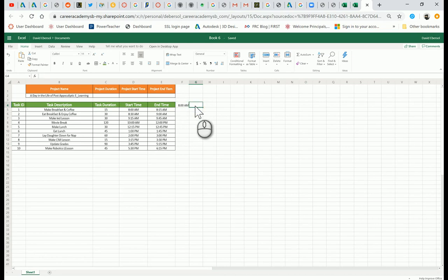Now, the next time has to be the next duration of time. So I'm always going to be using 15-minute increments. So 15, 30, 45, 60, 75, 90, 105, 120, so on and so forth. If you really want to get pedantic, you go down to 5-minute increments, which would be crazy. Your Gantt chart would take forever. I think 15 is kind of a sweet spot. 30 minutes was just too much because sometimes a task only takes me 15. If a task isn't going to take you at least 15 minutes, it's not a task, it's just moving.